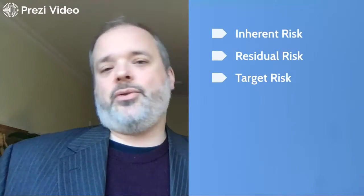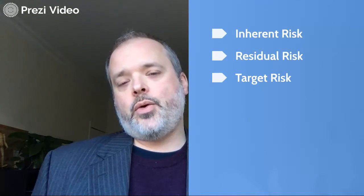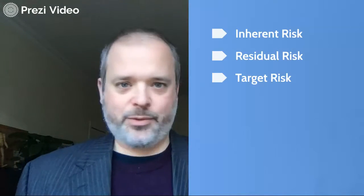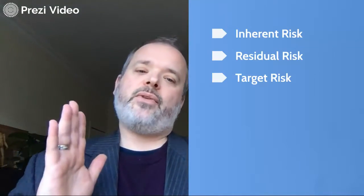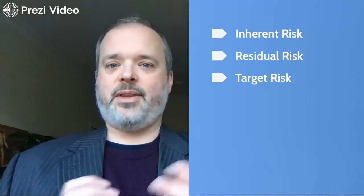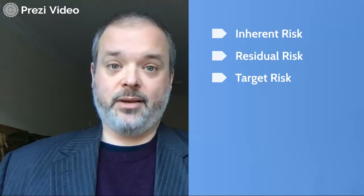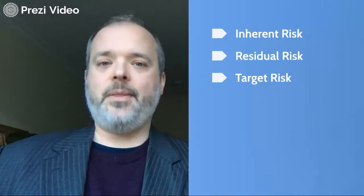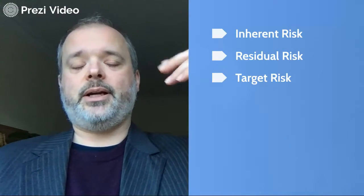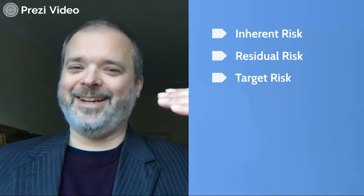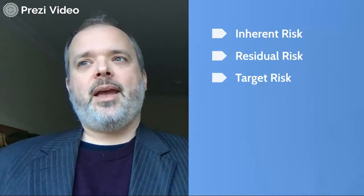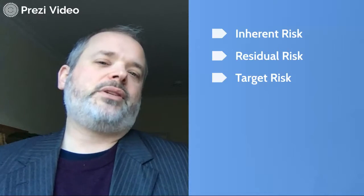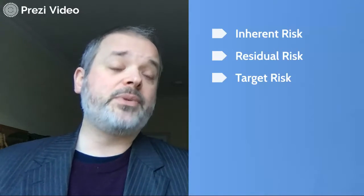This brings us to the last point: things you can do to improve your risk register by adding the notion of target risk. In your normal risk register — and almost every risk register I've ever seen — you have an inherent risk, which is the risk this thing represents if you don't do anything. Then you have your residual risk, which is what happens after you've treated it and done things to lower the risk. Hopefully the residual risk is lower. But almost every single risk register I've ever seen in my career stops there.